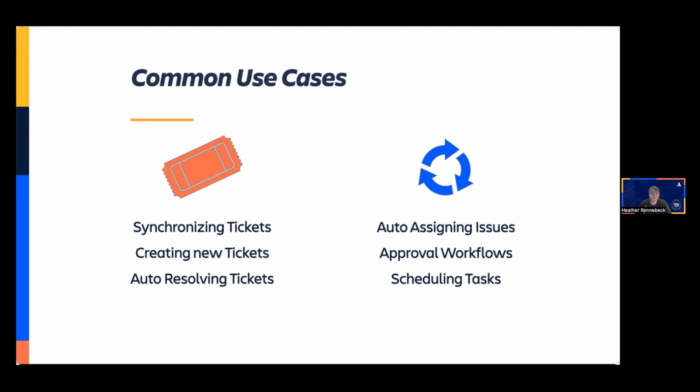Rules are typically used for auto-assigning as well, based on a set of conditions. For example, if you're working in a very specific region and you're sharing a project on a global scale with people from several regions, it can be decided that all tickets in your region would be assigned to you. All tickets in this region would be assigned to a different person.